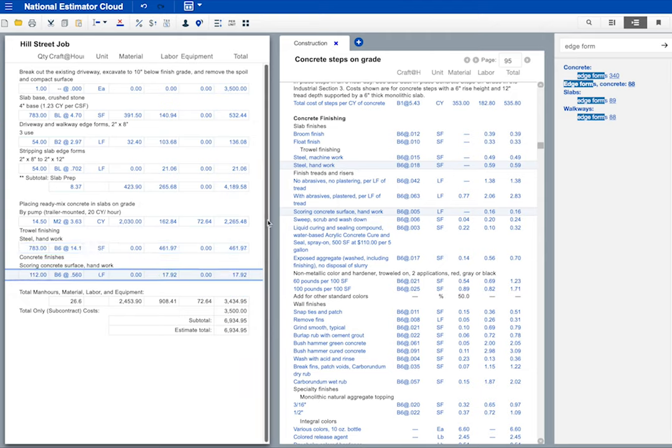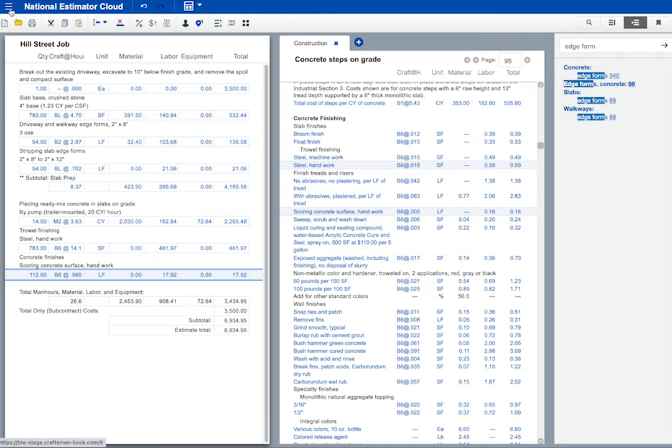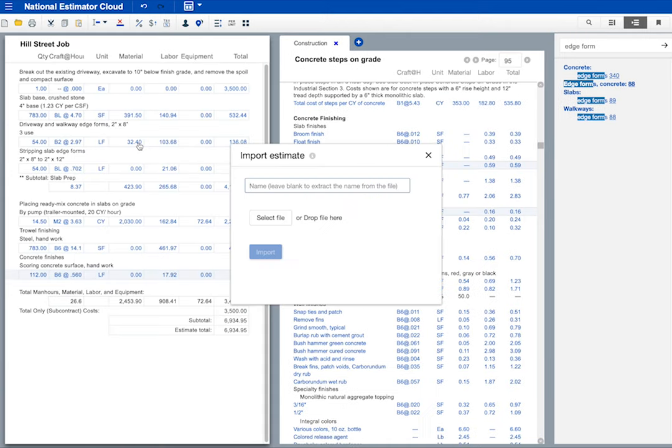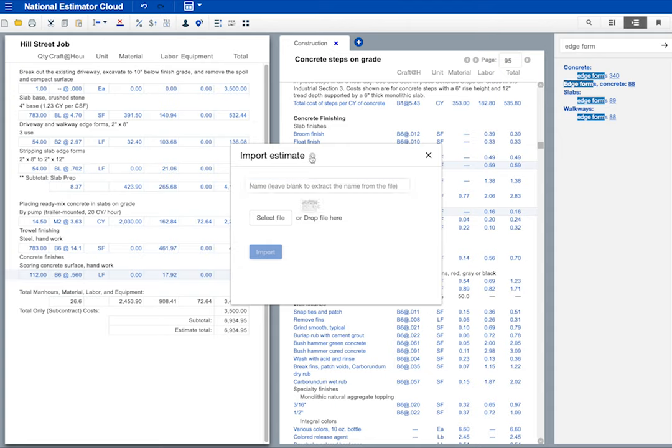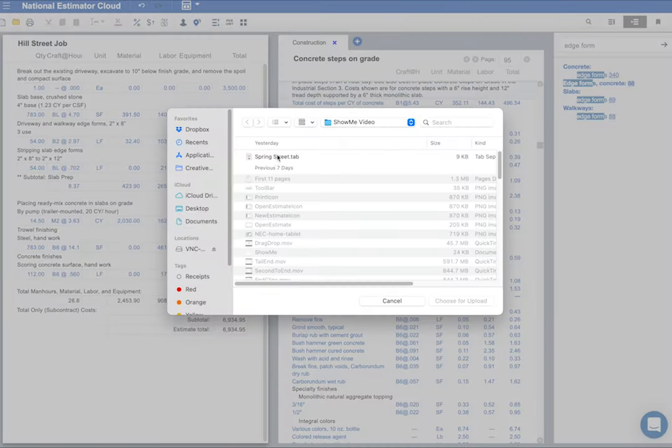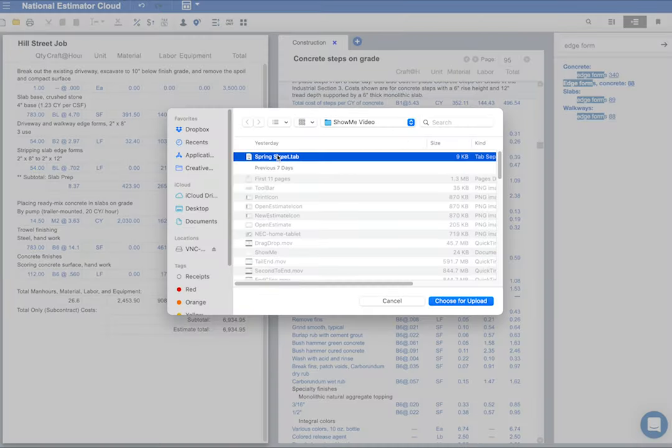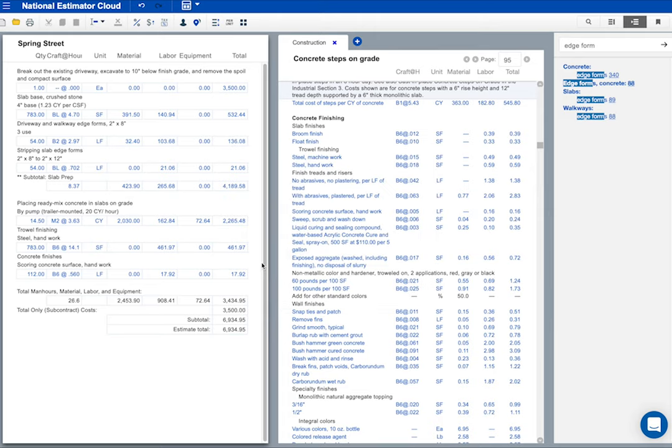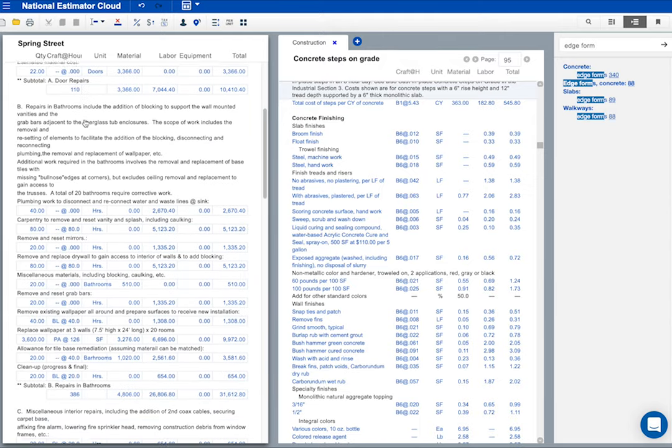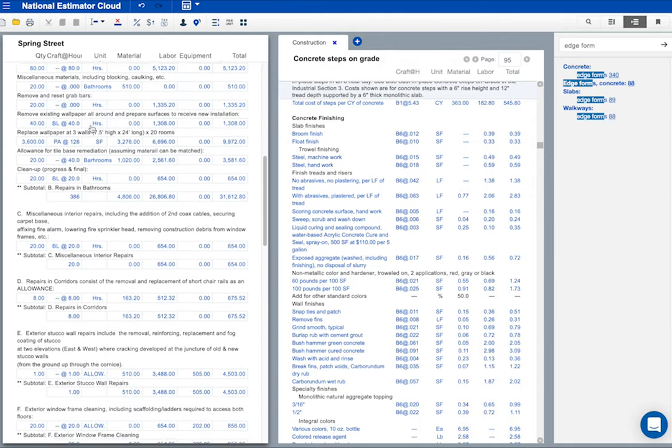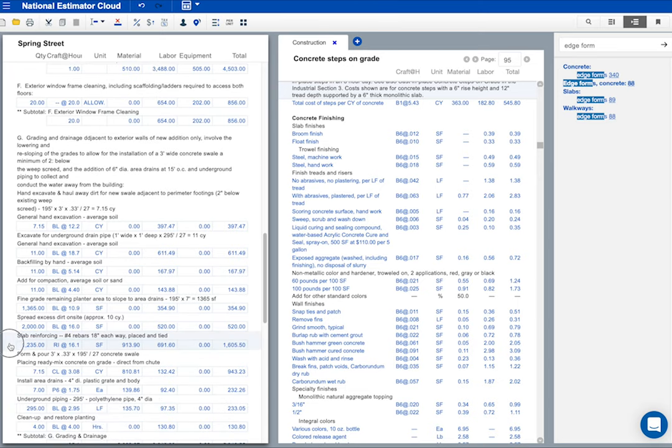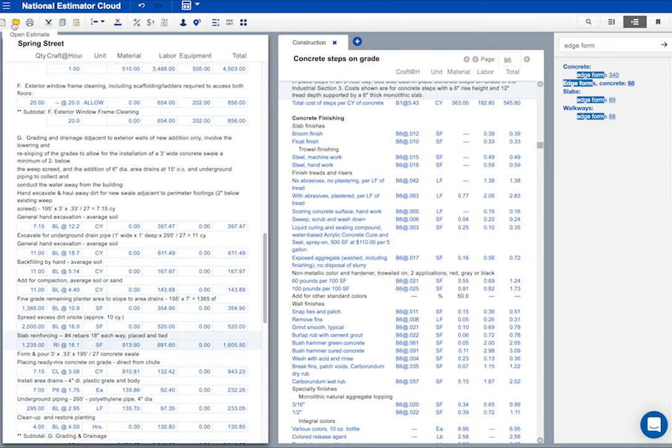We're almost done. The last item is reinforcing steel. The owner wants number four rebars 18 inches on center both ways. I could pull these costs out of a cost book. But I estimated a job like that a while ago in the desktop version of National Estimator. The Spring Street job. I'll import the estimate I did for that job and paste rebar costs into this estimate. The information icon here explains how to import the file. I'll select the file. This is the file I want. And I'll click to import. Okay, here's the estimate. I'll drag the slide bar down to find rebars.